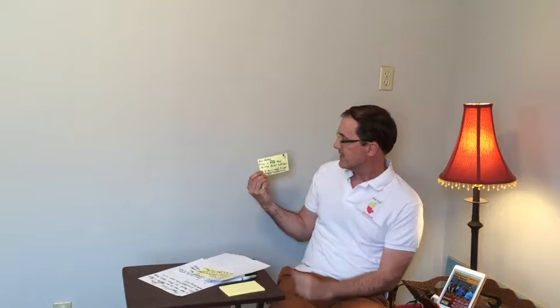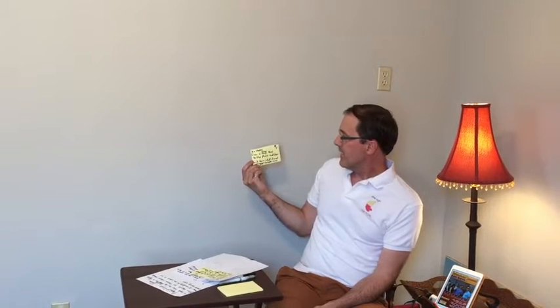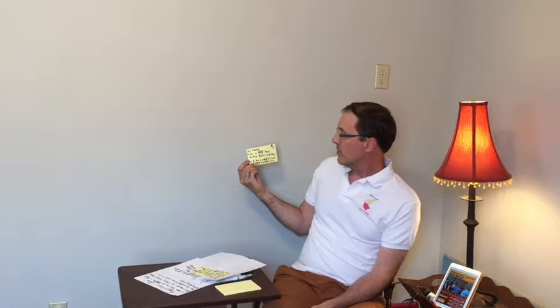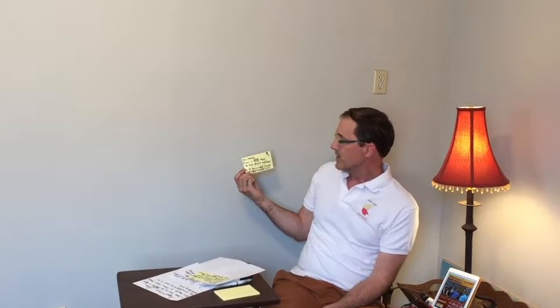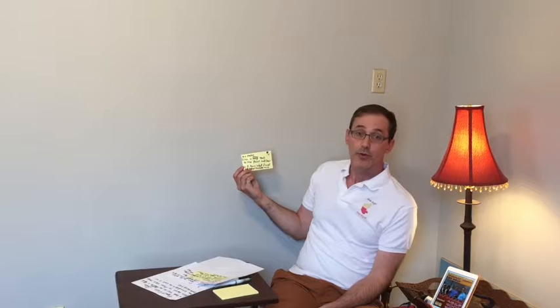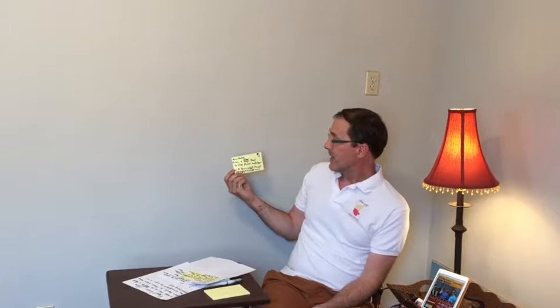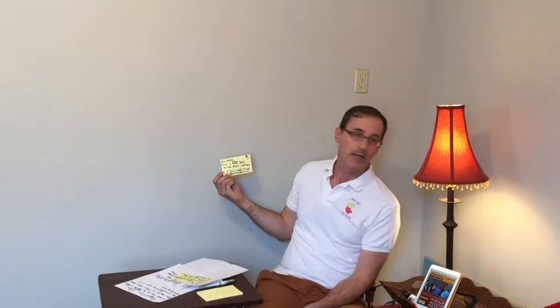and I'm using the geometric series for the story sizing. So I'm having an 8-point sprint, 1 week sprint. As a reader, given a novel that's to the point and clear, I learn what I need and enjoy the experience. Okay, so that means I'm going to go back and review the story aspects for the whole novel, for all 325 pages, and fix any problems that are story or plotting problems. But I'm not going to worry so much about the language.